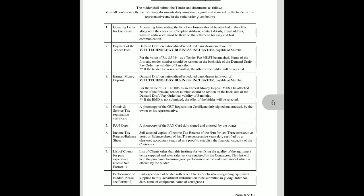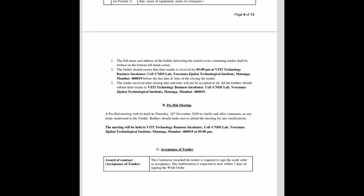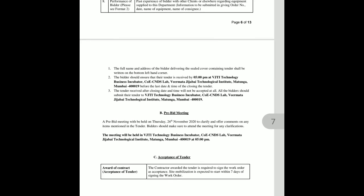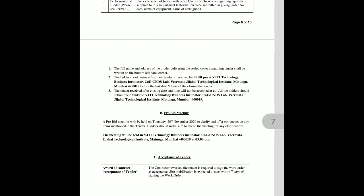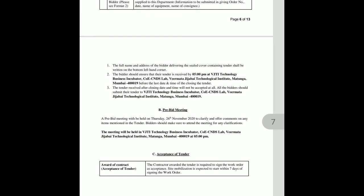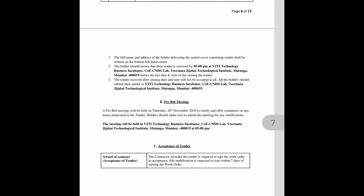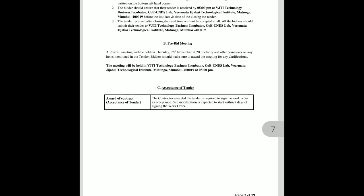All these documents are put in an envelope. The full name and address of the bidder should be written on the bottom left-hand corner of the sealed cover. The bidder should ensure that their tender is received by 5 pm at the given address. Tenders received after the closing date and time will not be accepted. The pre-bidding meeting, which is the opening of the tender, has its time and date mentioned on the certificate.